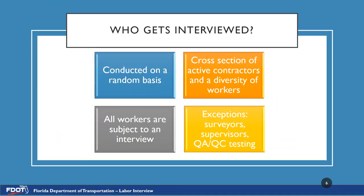Who gets interviewed? Interviews are conducted on a random basis and must be completed across all contractors active on the project. A cross-section of active contractors will help ensure that a diversity of workers are being interviewed. All workers are subject to an interview with the exception of surveyors, supervisors, and QAQC testers. These people do not need to be interviewed in order to meet the required minimum.